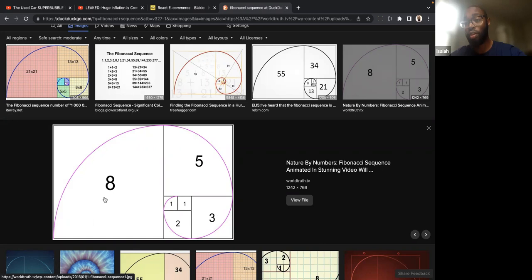Eight is going to take a week, or it may go into the next week a little bit, maybe 6 or 7 days: 5 days for the work week plus 2 days. 13 is going to take a whole week, or 2 weeks to do. Actually, anything labeled 13 can take 2 weeks or more, and more can be a month, 2 months. We don't know how long it's going to take.